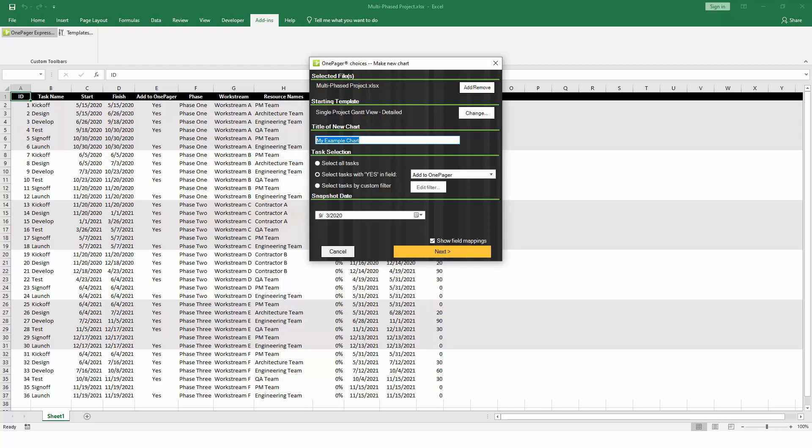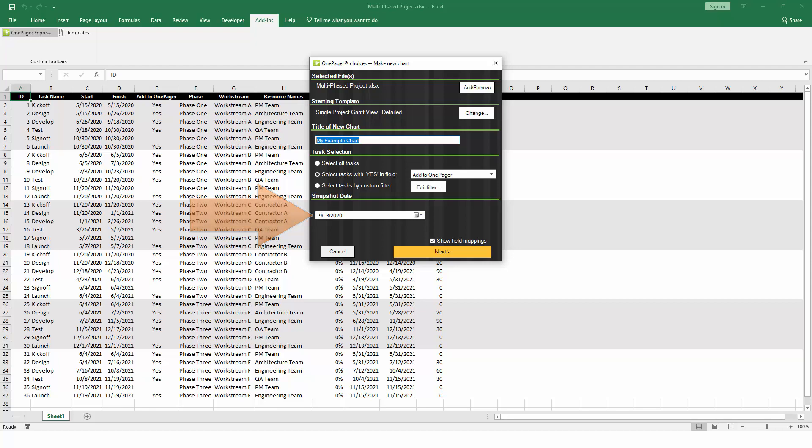The snapshot date is the status date of the report that you're about to create. Over time, you can update this same chart with a different date, which will enable OnePager to track changes to your project as they happen. Typically, when creating a new chart, you can just set the snapshot date to today's date.